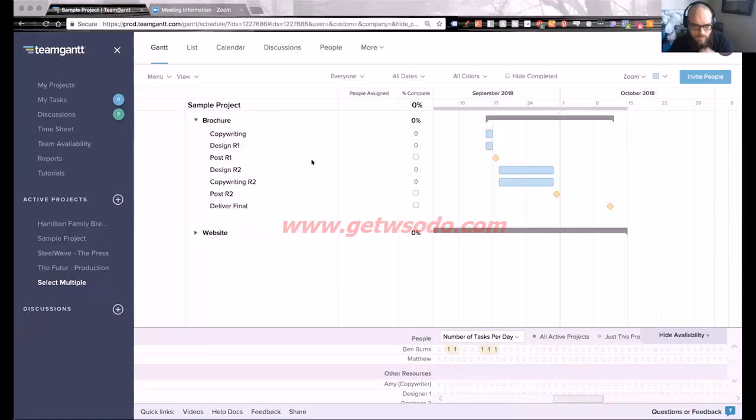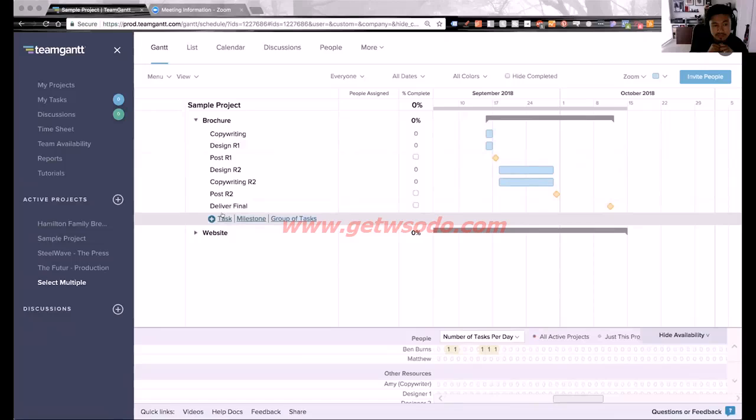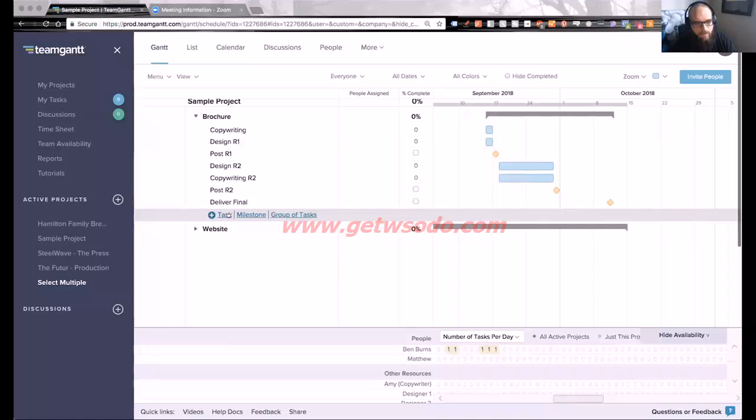But I also wanted to remind you guys that when you create these calendars, it's vital to include the feedback loop in it. This is one thing that we've learned the hard way when planning for time. When we work with other agencies or people who are used to working with creative shops or production houses, feedback cycles tend to be a little quicker. And then obviously you guys probably know, working with clients, especially direct to clients, small businesses, sometimes those projects are so near and dear to their heart that it takes a little bit longer for them to make decisions.